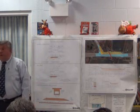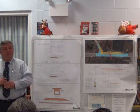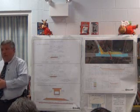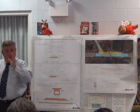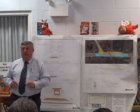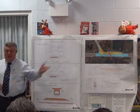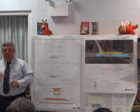Once the appraisal has been completed, submitted, and reviewed, there's a couple other things going on in parallel with this. Obviously, we're dealing with water, so our environmental office is doing an environmental survey, getting the other state and federal agencies involved to sign off on the permits that we need to do this project. Also, our legal department is updating the titles so we know who to deal with and who to cut the check to for the rights that we're going to acquire. When all of that's together, then I can make an offer.